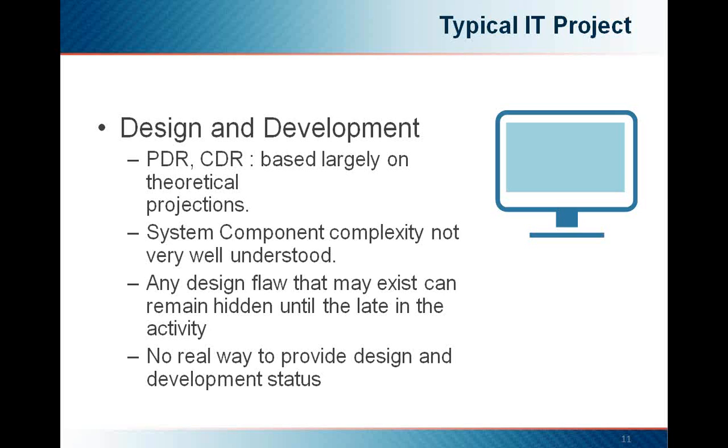Correct. And a very large effort is expended to produce the detailed design of the entire system. Now any changes will affect not only the requirements document but the design document as well. And the time frame for the design document, of course, has already been established. Monitoring of the design phase at this point actually becomes a little tricky. In reality, the design process is often measured very subjectively.